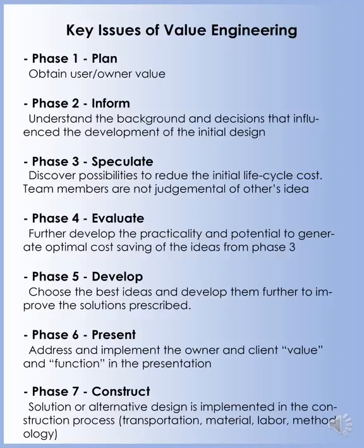In the information phase, the team understands the background and decisions that influence the development of the initial design. The team in the speculation phase discovers possibilities to reduce the initial life cycle cost, and team members are not judgmental of others' ideas. In the evaluation phase, further development of the practicality and potential to generate optimal cost savings of the ideas from phase 3 are investigated.